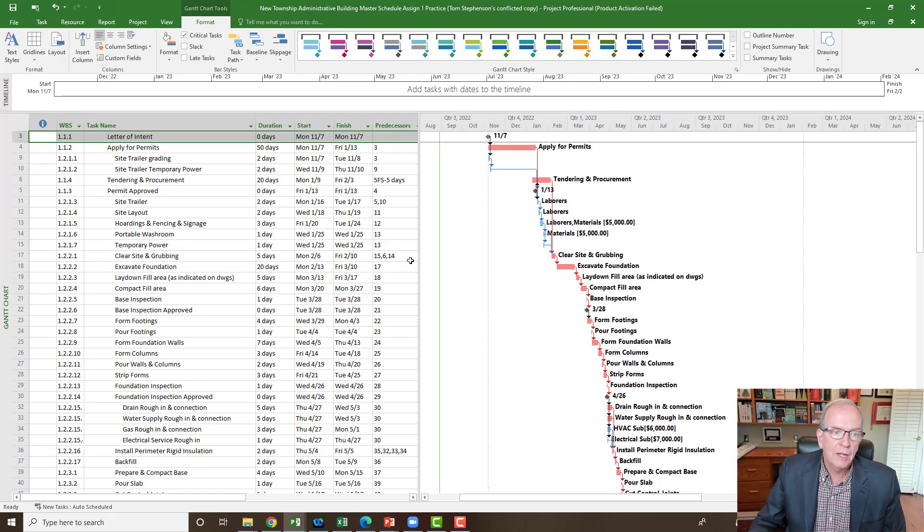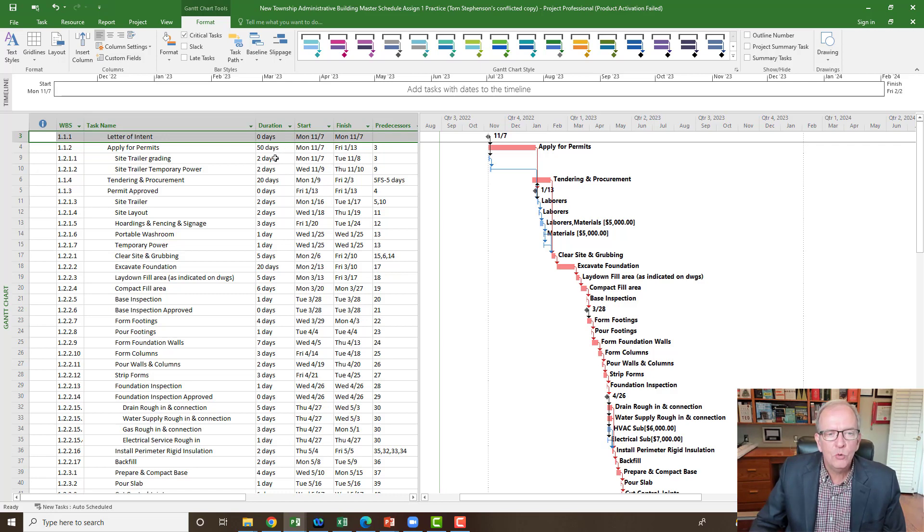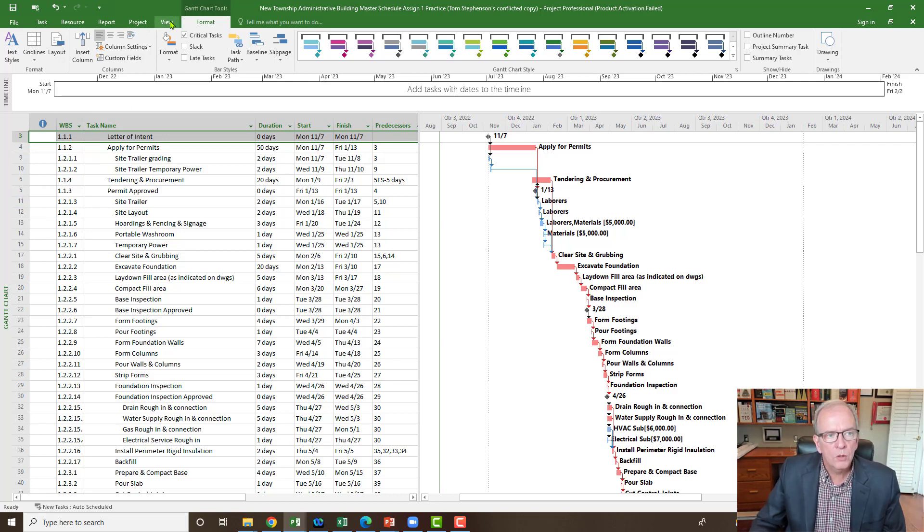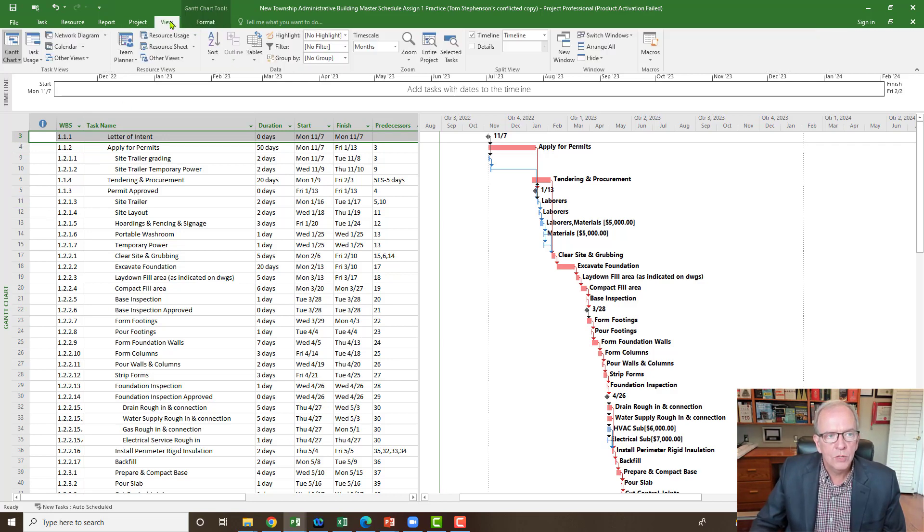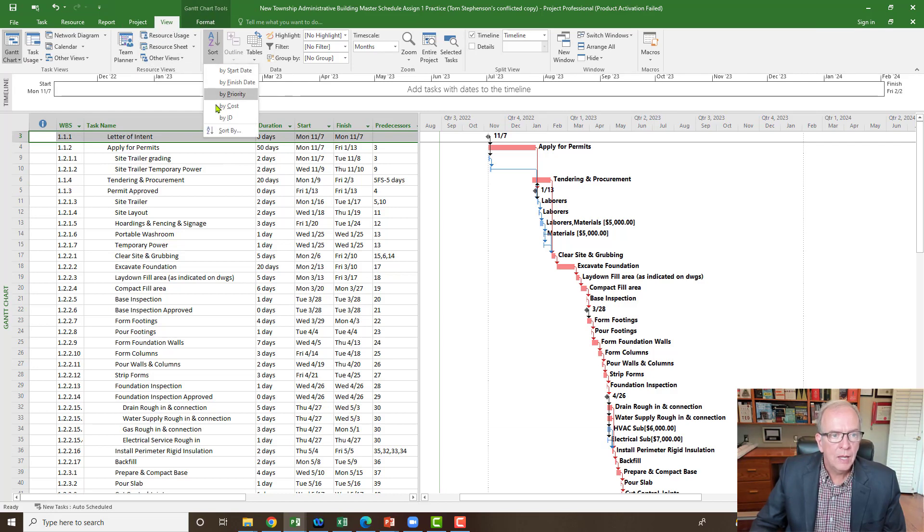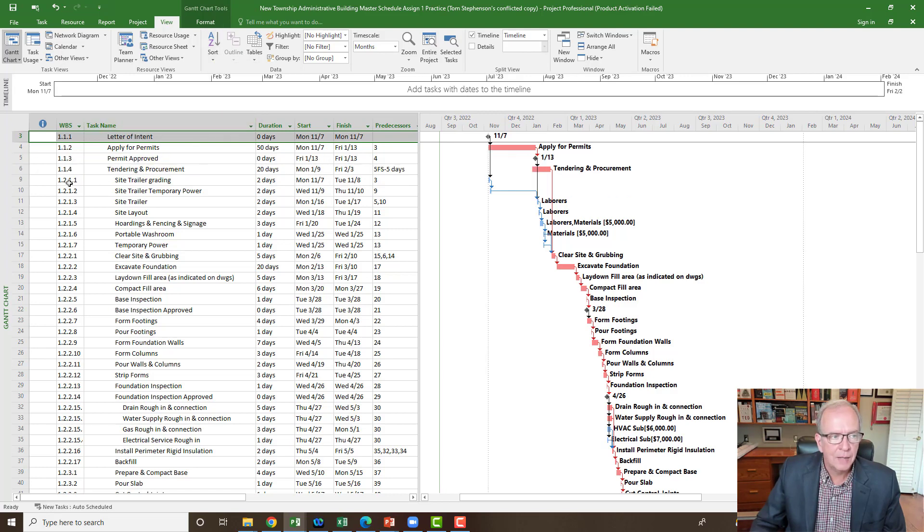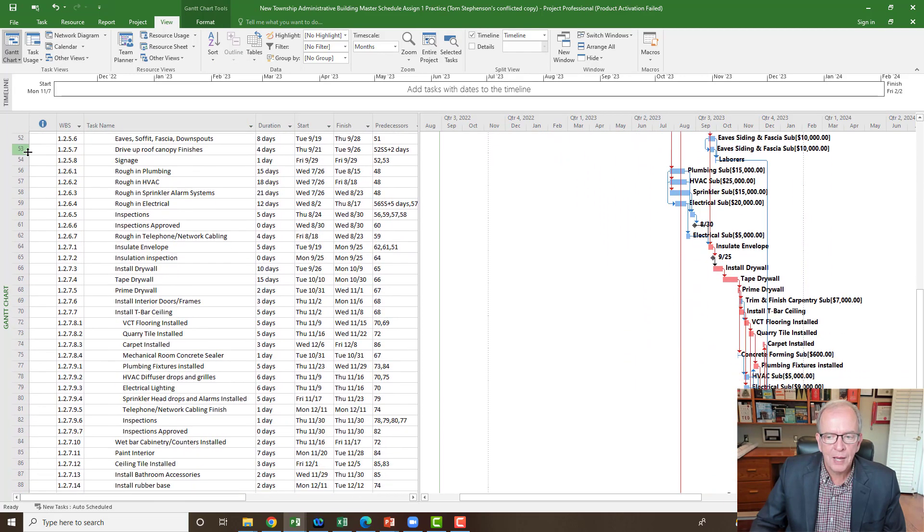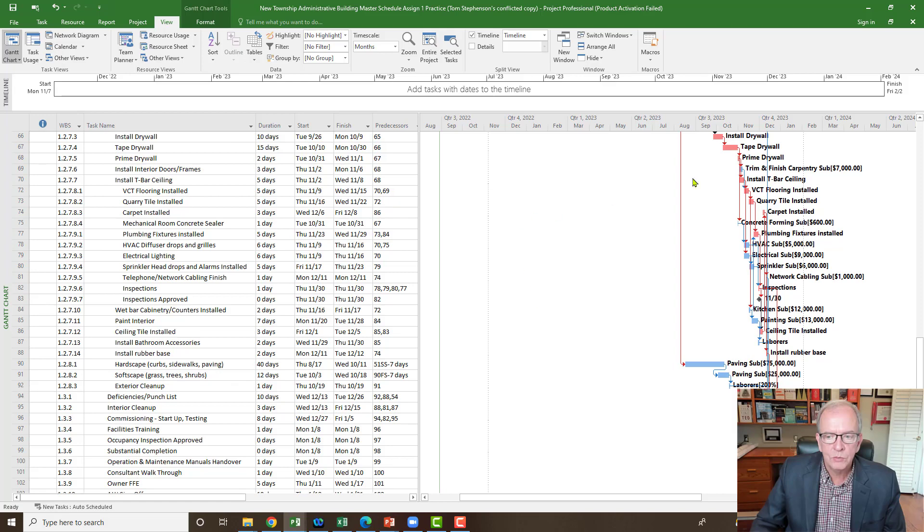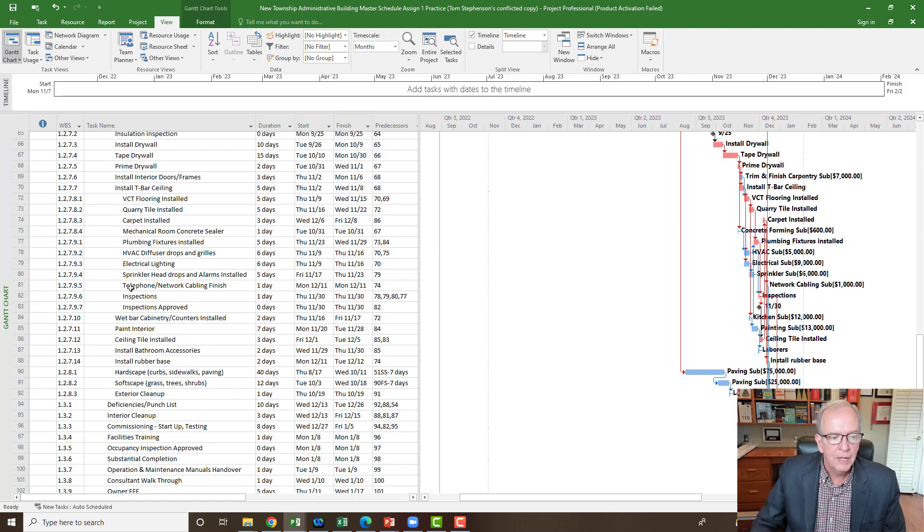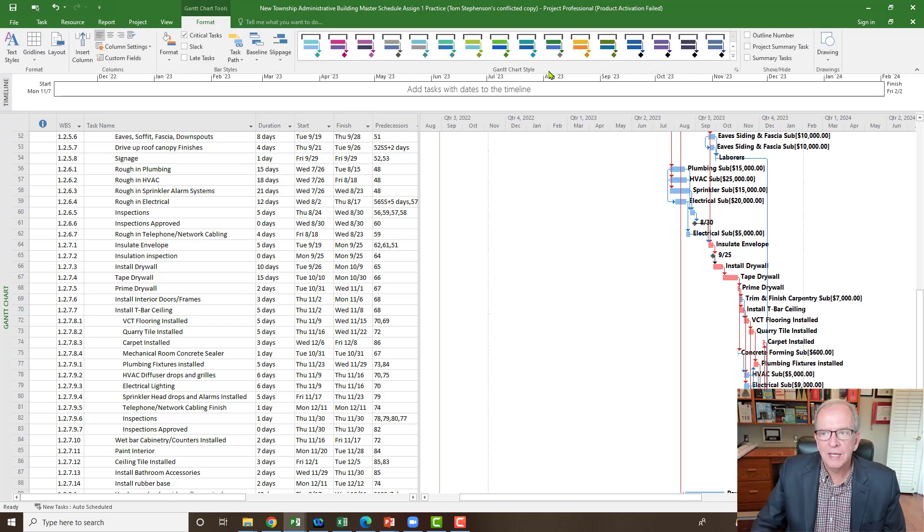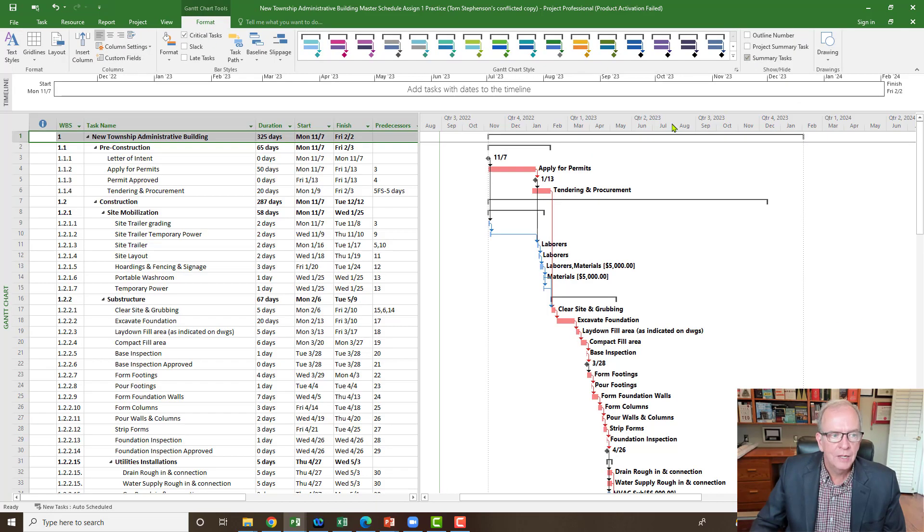Now what I would say to you, if you do this kind of sorting, it's good to remember that you did that, because then I always get students that are asking me, you know, how do I get it back to the way it was? Okay, well, one of the ways that you could do this is always remember you can go to View and Sort, and we had it sorted by ID. So I'll sort by ID number. And now if you follow it, it's pretty much back to the way it was, where we got things out of order. But they are ordered by ID. And then I can go to Format and say, you know what, I want all those summary tasks back. They're still there. They're just hidden, right? And so now I've got my project back the way it was. So that's helpful to know.